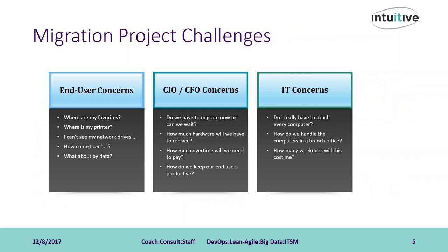The next stakeholder group, and arguably the most important, is the project sponsor. Your C-level executives will need a very different set of information than the end users. So be prepared not only with the technical implementation plan, but a financial breakdown of costs aligned with a specific schedule of the implementation timeline, taking into account various business-specific constraints which may affect your implementation plan, and accurate time estimates of how long each computer being migrated will be out of service.